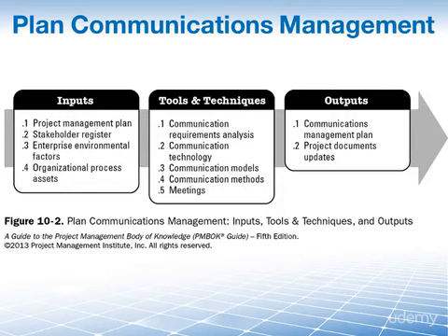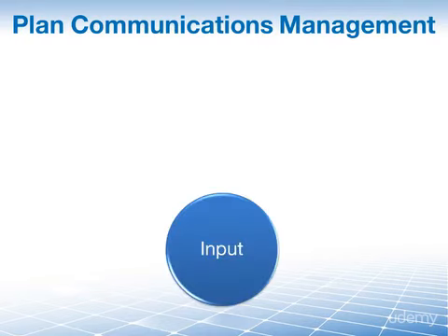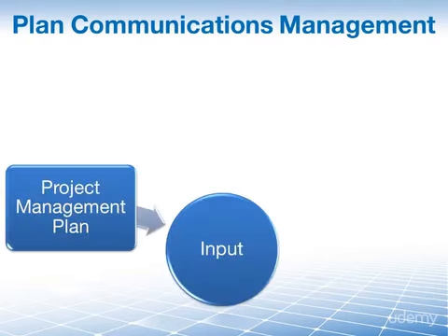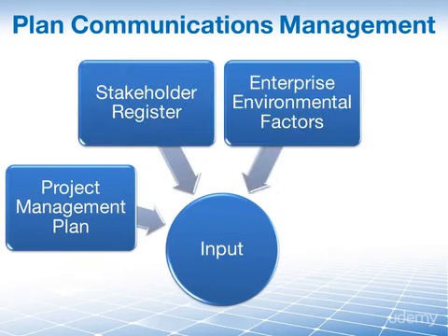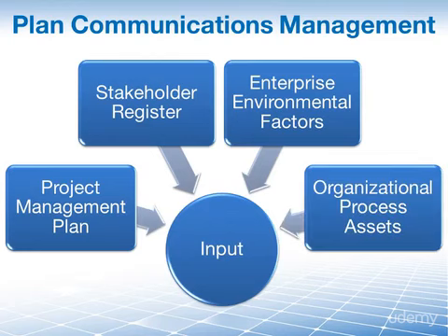If you understand the why of each of these ITTOs, if you understand the concepts of each of these ITTOs, you will understand what we do in Plan Communications Management. The four inputs of Plan Communications Management are the project management plan, the stakeholder register, the enterprise environmental factors, and the organizational process assets.